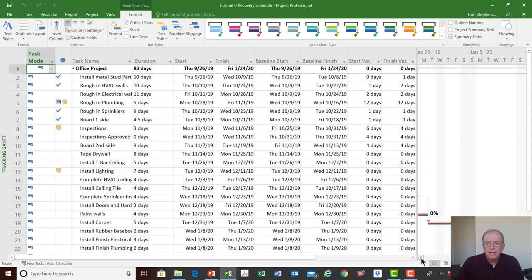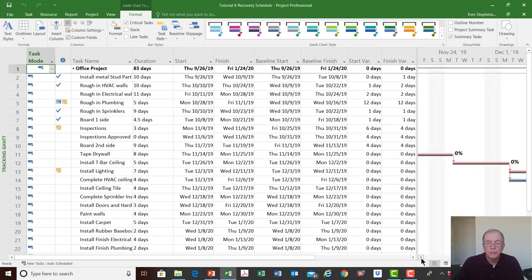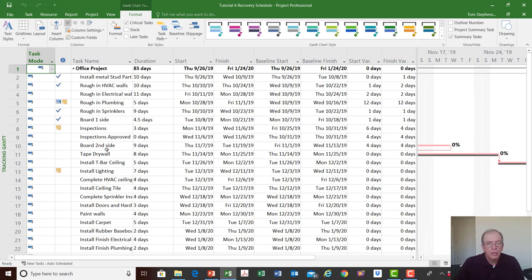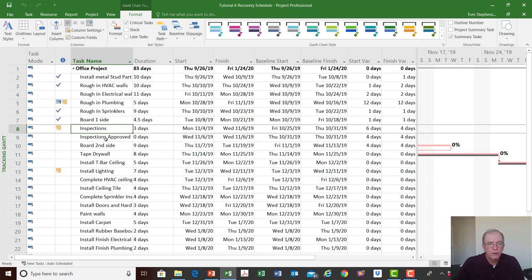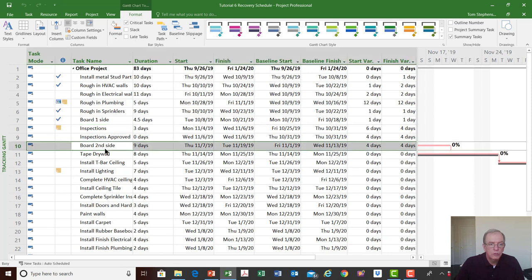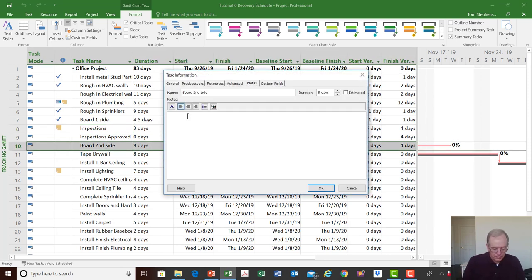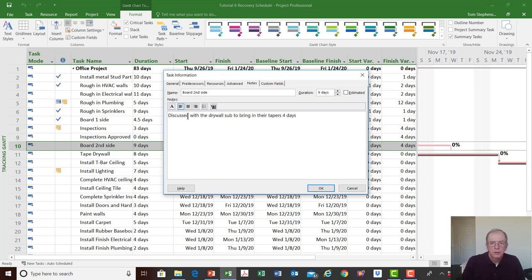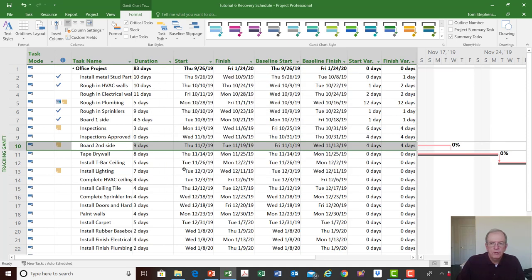This recovery schedule is now the new updated master plan — the schedule you're going to follow. You've changed how inspections will be done from five days to three days, and you changed the drywall relationship. I would put a note under board second side saying 'discussed with the drywall sub to bring in tapers four days early.' As long as you've discussed it and they've agreed, it's part of your new plan.